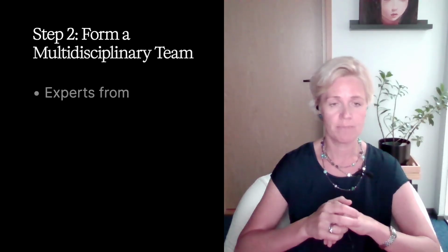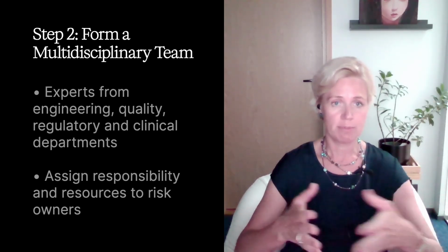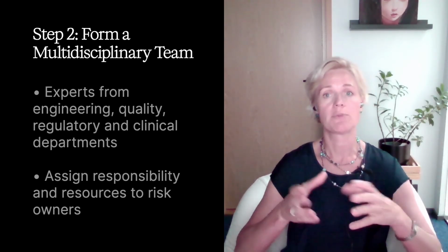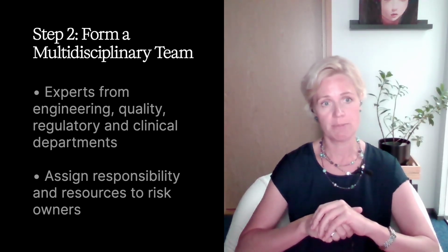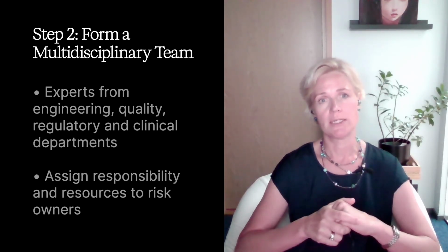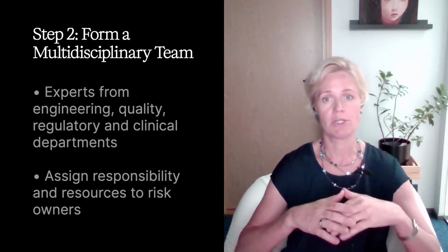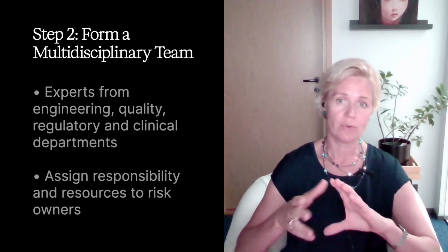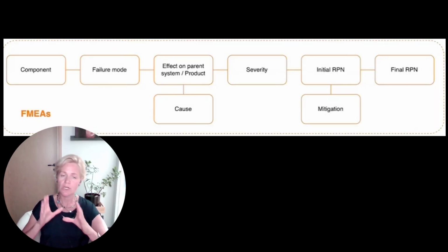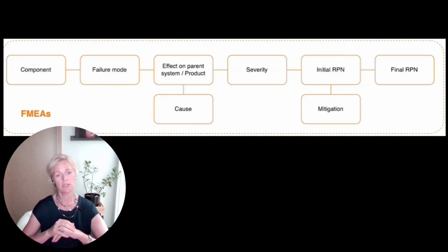Second, form a multidisciplinary team that includes experts from engineering, quality, regulatory affairs, and clinical departments, and then assign responsibilities to each team member to establish a clear communication process that ensures effective collaboration throughout the FMEA risk analysis. Remember, not only assign responsibility to risk owners, but also authority to ensure that the risk owners have the resources to really manage the risks that they own.